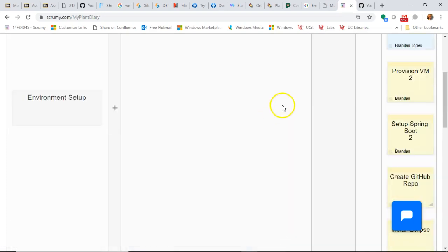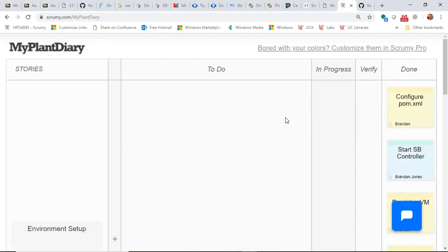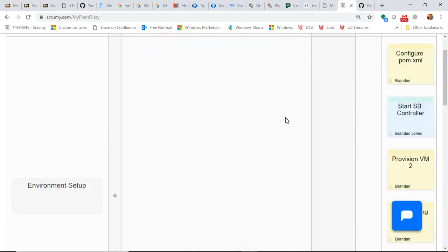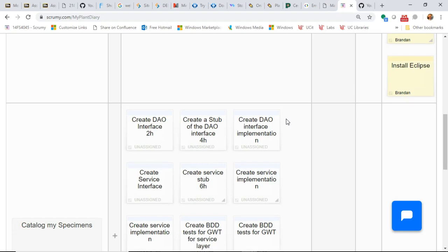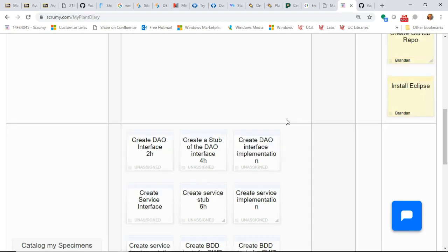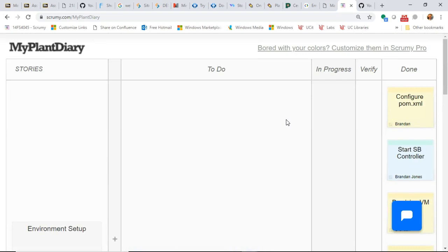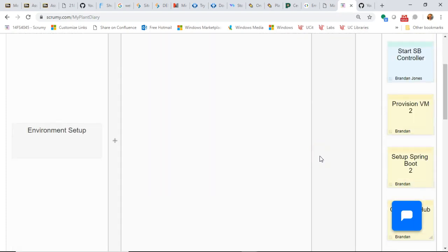Then as we work on a task, we know we move it in progress, and we know there should be one task in progress for everybody on the team. If you find that your team starts to get dysfunctional, that is, people aren't turning their work in on time, people aren't attending stand-up, and generally things are lagging, ask yourself if you're really using the Scrum board and really doing stand-up meetings. Don't get lazy with the stand-ups. It's very important that your group pick a time when you can all meet either in person or virtually and go through the stand-up. In the stand-up, you say what you did since the last stand-up, what you're going to do until the next stand-up, and any blockers that are in your way. You also update the Scrum board.